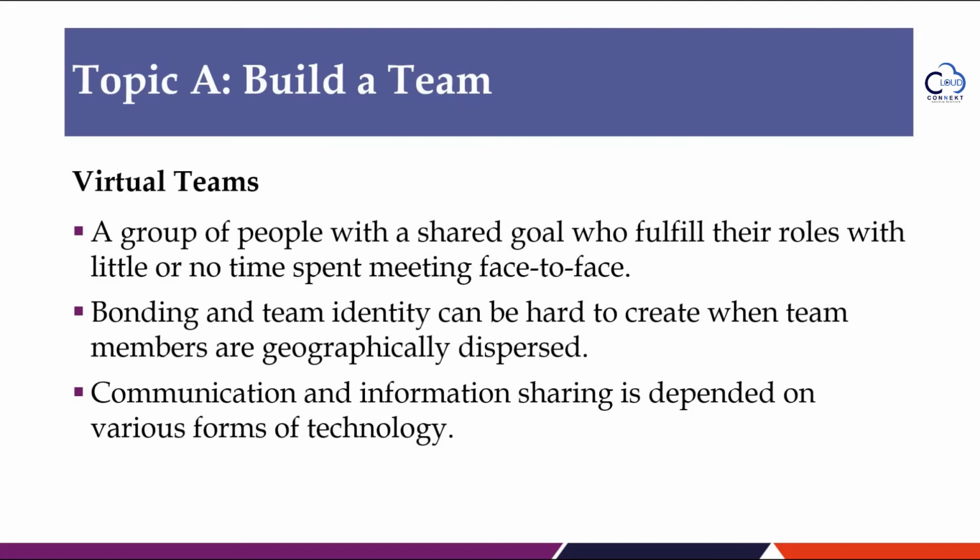Virtual teams can leverage technology solutions to facilitate face-to-face communications, store and share files, create threaded discussions and wikis, and manage the team's calendar. Agile tools allow for the publishing and sharing of team task boards, burn-down charts, and other information radiators to improve visibility and promote collaboration. Information radiator is the generic term for visual displays that are placed in a highly visible location so everyone can quickly see the latest information.